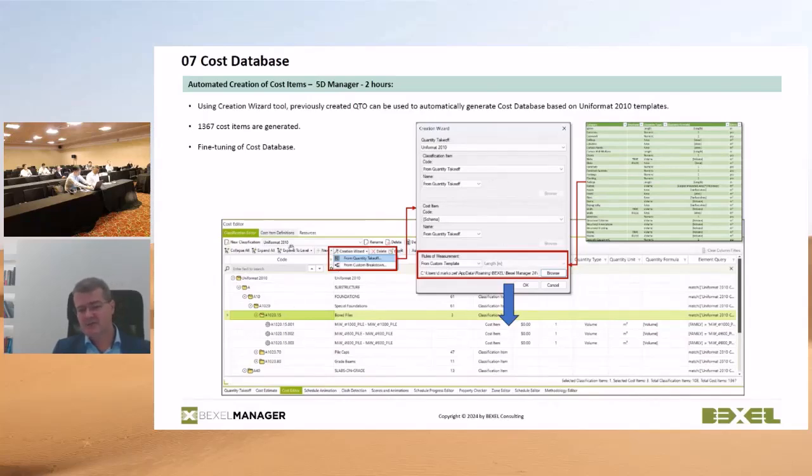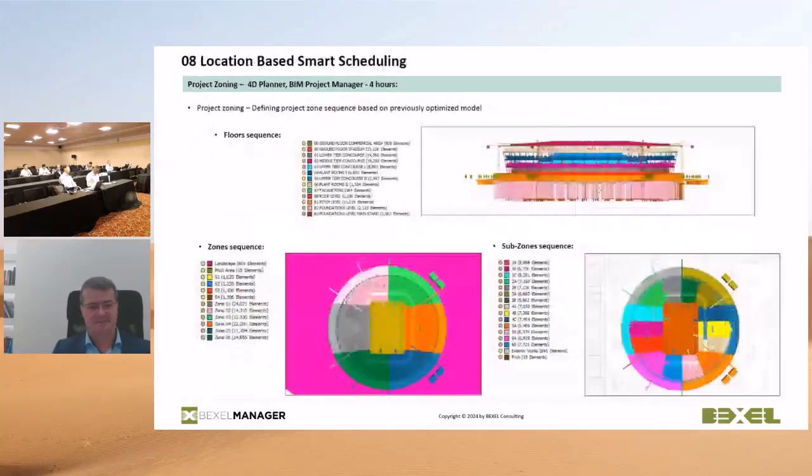And then Excel automatically calculates, based on the rules and how the codes are generated, all these cost items and connects them with the BIM models. Then, of course, the prices are defined or can be loaded from predefined templates. In the next stage, it took 4 hours, and this is a huge time saving.